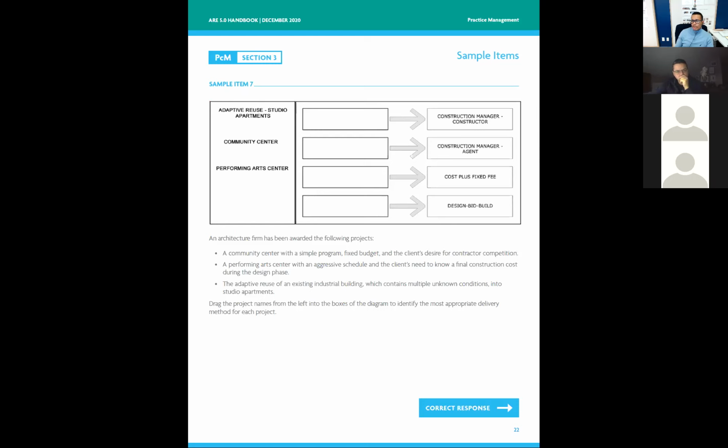You should be asking for a premium for that time, because technically, if the project was to take 3 months, you would probably do it with 3 people. If it's supposed to be done in a week, you probably do it with 8. You're going to have to get more people involved to get it right, and it's costing you a lot of money up front.